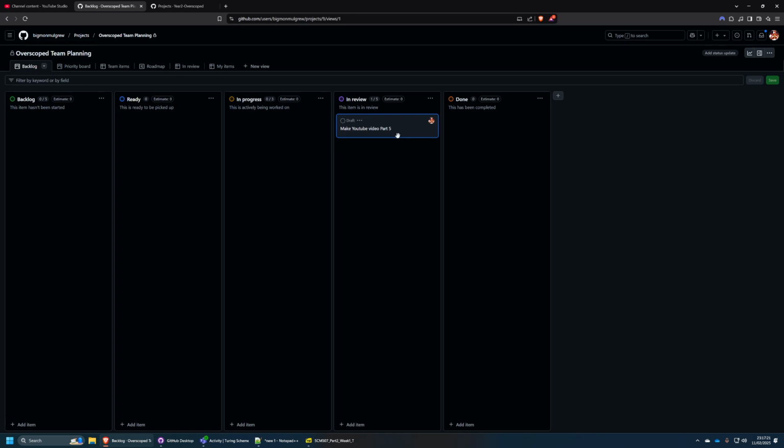Now, that's my involvement done unless it gets rejected. If it gets rejected, my project lead is going to drop it back to in progress, and they will hopefully send me a message saying, hey, do a thing, this needs to. Usually you will get comments within GitHub, but it would be nice if they get a Teams message or something like that. So they'll kick it back to in progress, and we'll go back and forth between in review until they're happy with it. When they're happy with it, your team lead is the one that will finally put it in done, and you are happy. And that's basically it. That's what you need for a team project.